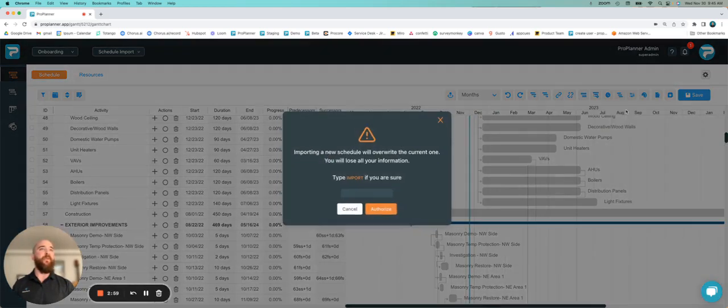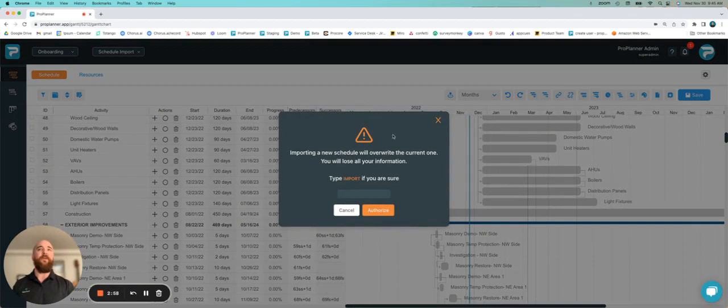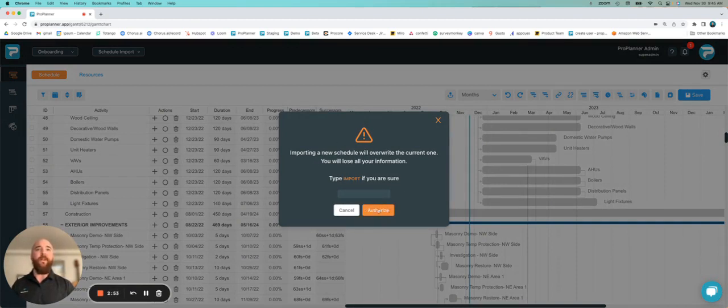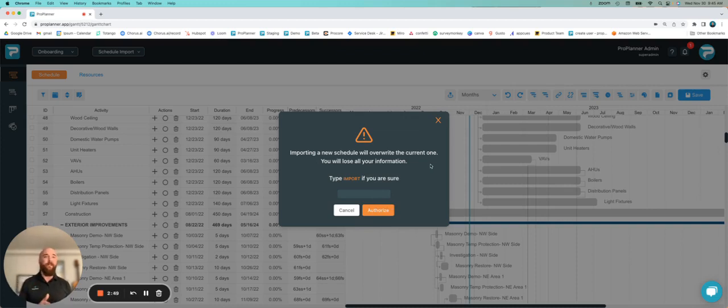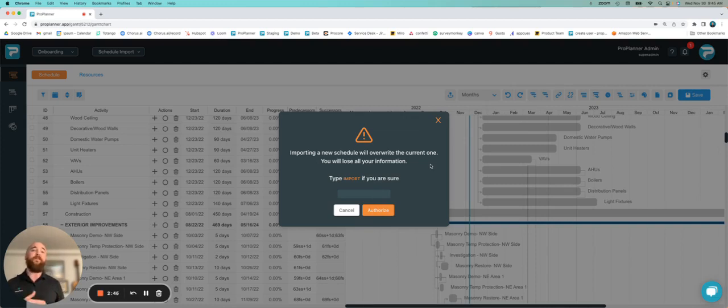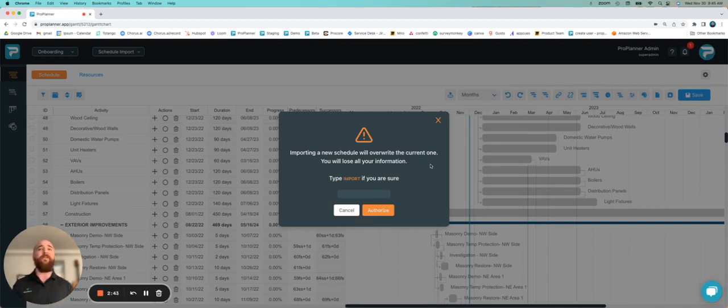I can select import new schedule, and then you'll receive this warning sign. It says, please type in the word import, and that will allow you to authorize the import of a new schedule. Please note, that's going to delete all of your current activities. And if you have a look ahead schedule connected to this schedule, it's also going to delete that.